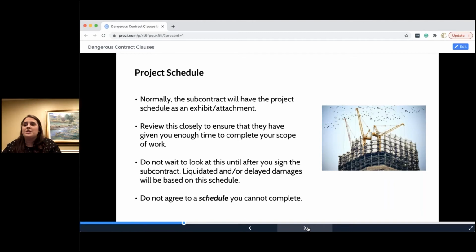If anyone was on any projects during Hurricane Harvey, it could be a weeks long delay. It could be a couple of days or a week, the way we had last week with the ice storm. What's the reality of that? What's excused? What's not excused? And if you're coming up against other terms in your contract that aren't excusing a lot of things, for example, acts of God, like an ice storm in Houston, Texas, isn't being excused. Well, the way you can protect yourself, instead of negotiating maybe that specific term, is you negotiate a longer time to complete your scope of work.